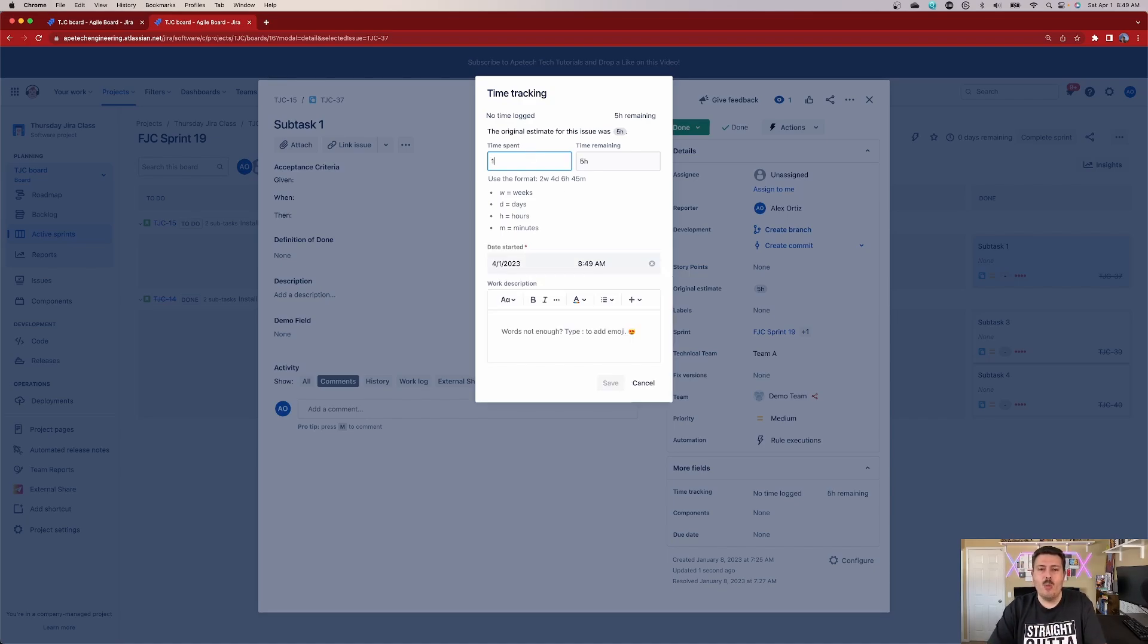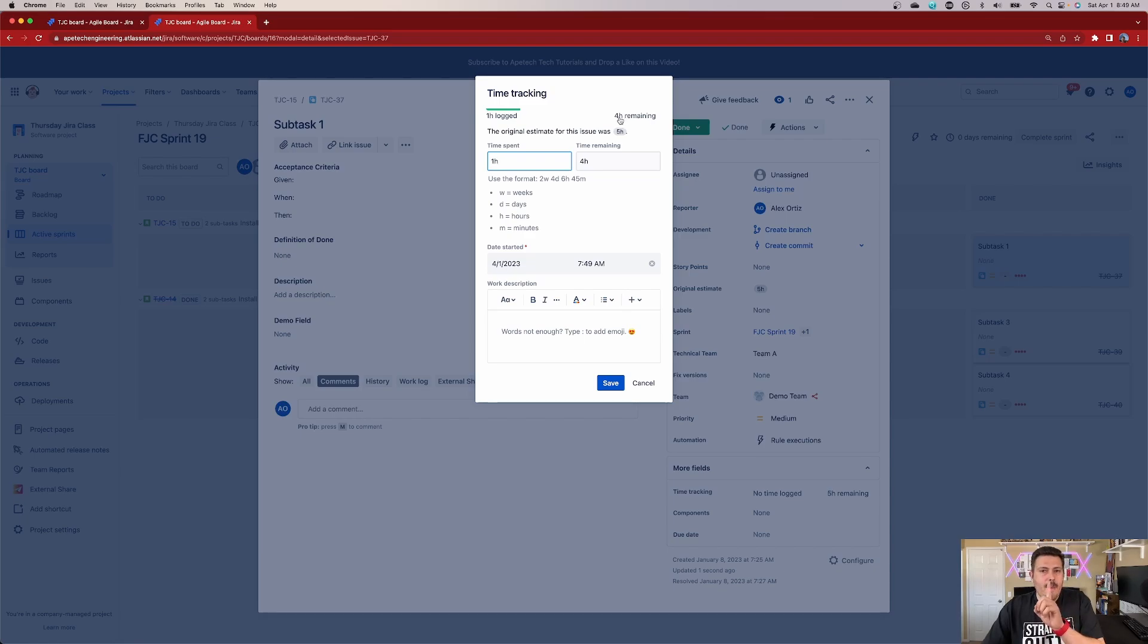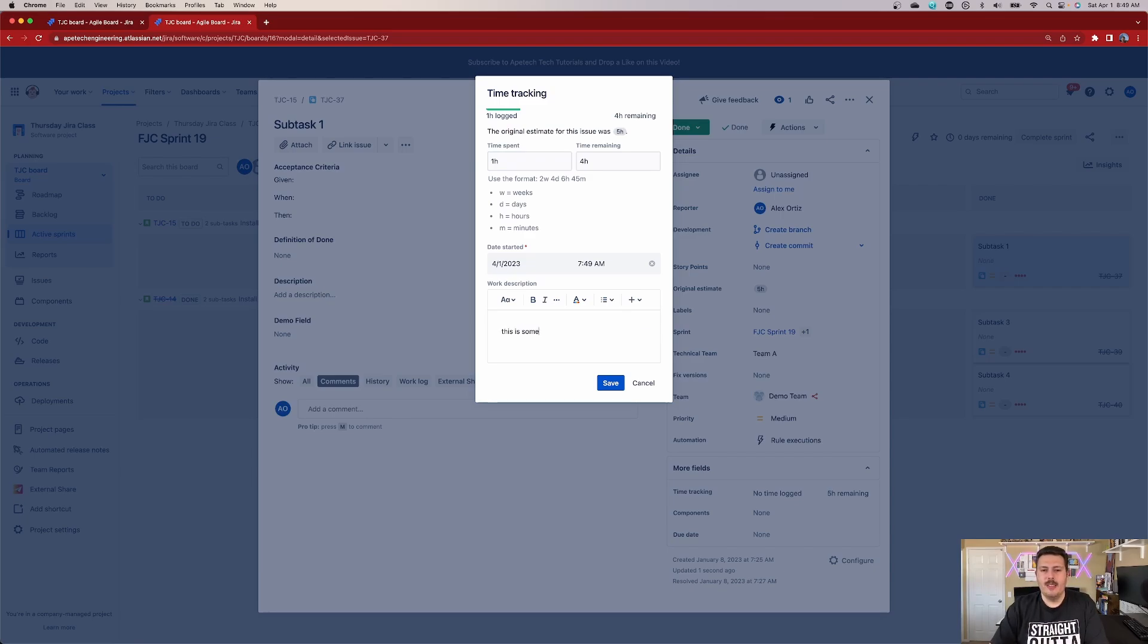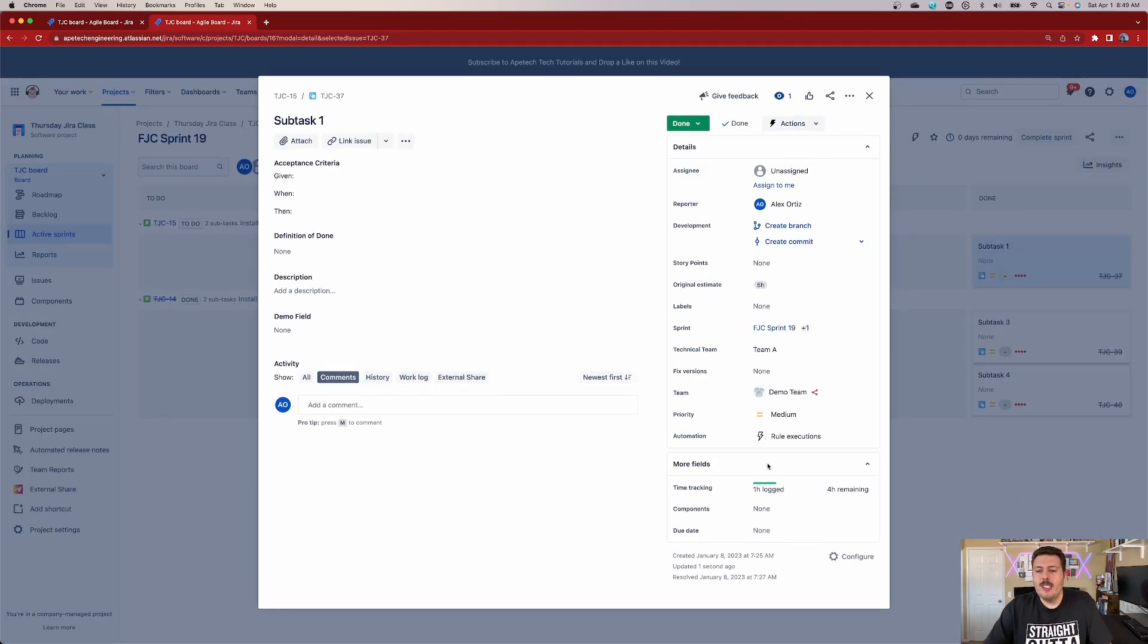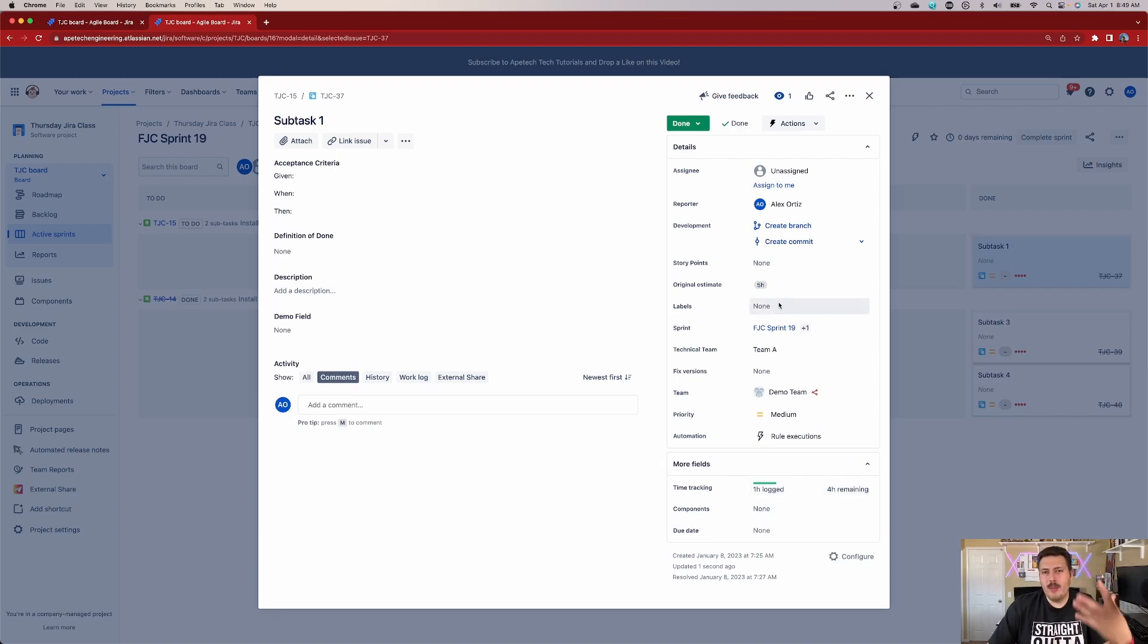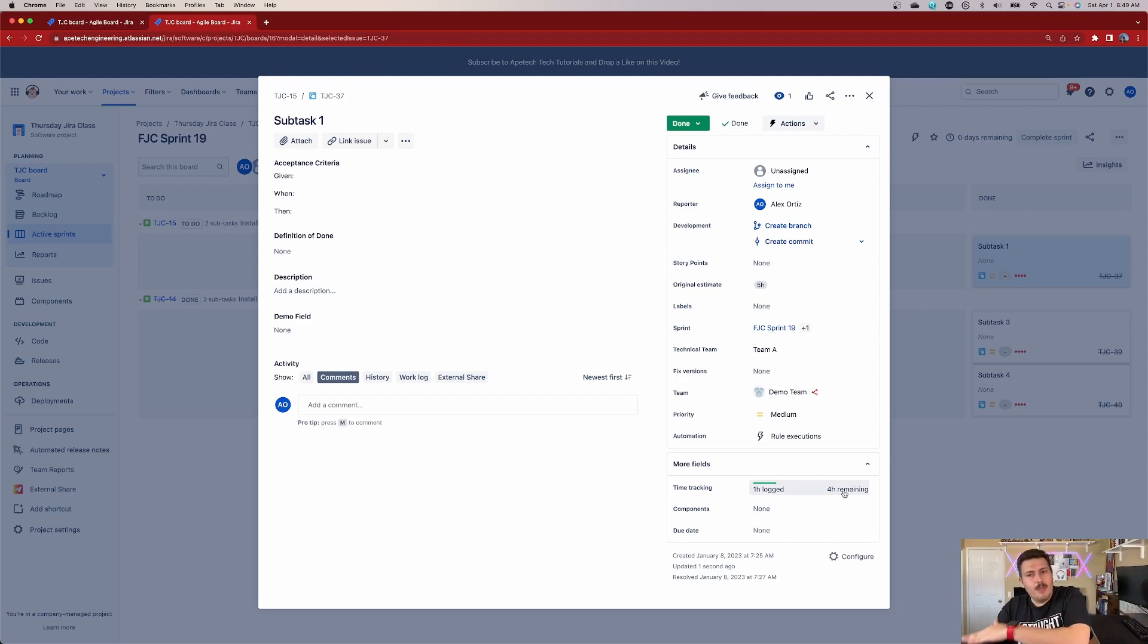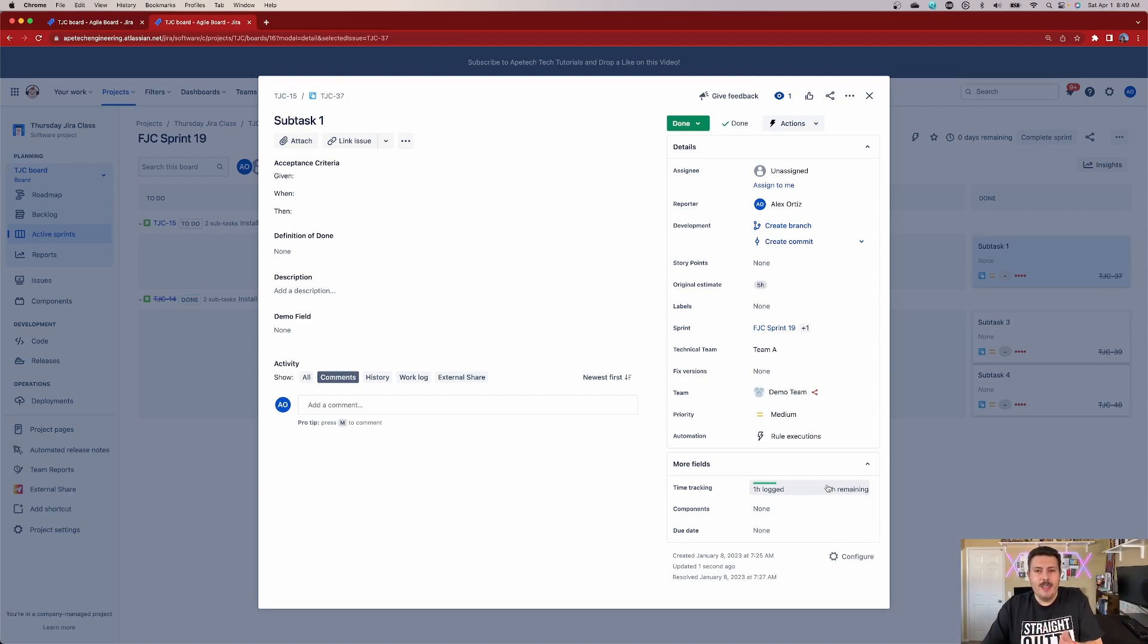So when I click, click in and let's just say I spent one hour today, you'll notice that my one hour is spent, but four hours are remaining and it's doing the mathematics and the calculation for me. Okay, this is something here. I'll click save. And so this is really cool because now I know it's doing this math based on my original estimate. It knows how much time I'm tracking and it's taking away how much time I spent against how much the original estimate was. And I now know if I am trending in the right direction or in the wrong direction.